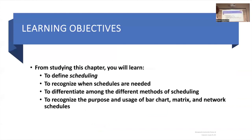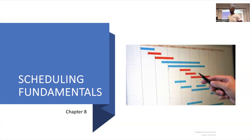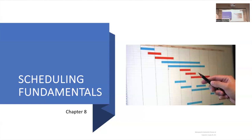Your schedule is critical. If somebody sets you back even one day at the beginning of a project — say you don't get your plumbing rough signed off on permits — that one-day delay at the beginning can set you back two weeks on the back end. So if you told the homeowner six months, now it's six months and two weeks.